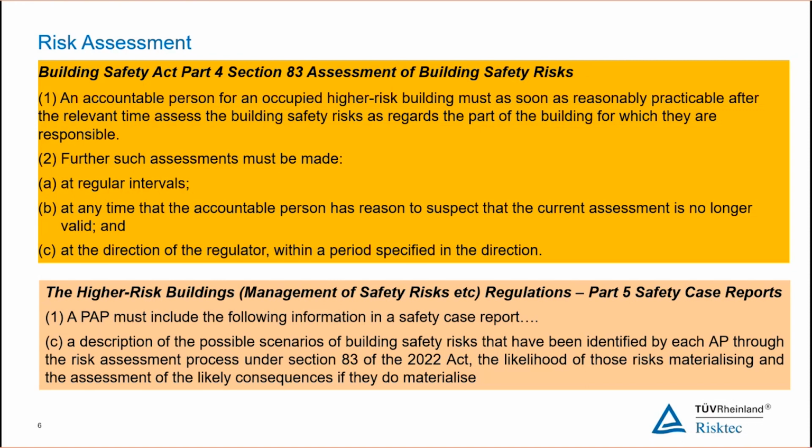And also, if there is any suspicion that the current assessment is no longer valid, things will change. The way that we operate the building will change. Possibly the risks, the scenarios that we're responsible for managing, may also change. So we have to go back in, and if there is a management of change process, or a prompt to say that things have changed, then we have to revisit the risk assessment at that point.